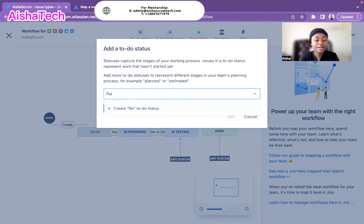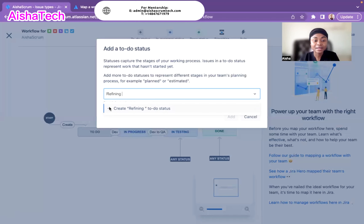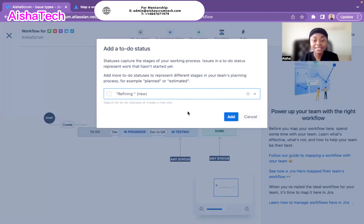Let's create a status called 'refining' — this is still under to-do, meaning we haven't started working on it yet. I'm creating a status called Refining, meaning that before we can mark a ticket ready for work, it needs to be refined. When I type the name, Jira shows it's new since I didn't have it before, and I hit Add.